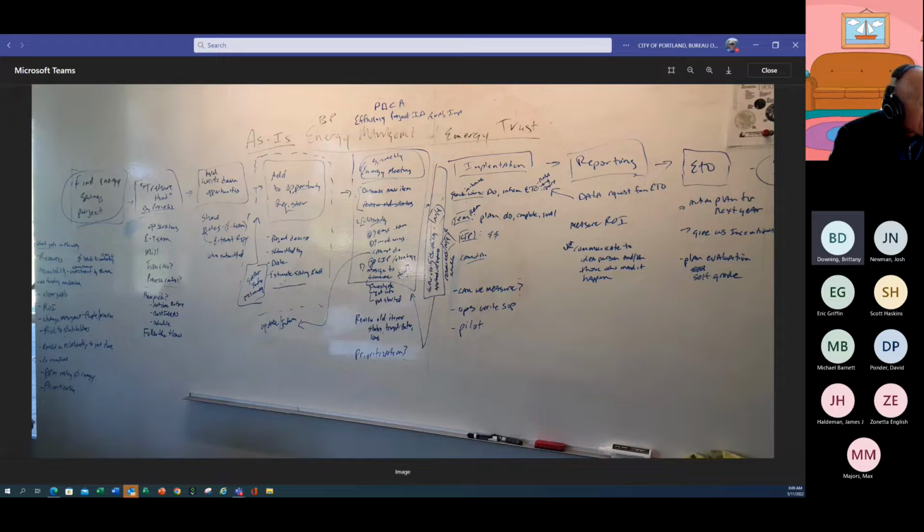The first one would be quick wins, basically something we can quickly do, wouldn't require a lot of money and wouldn't really require a lot of effort. Gems being, it might take a little bit more effort, but the savings would be great and it would be a huge win. And then going up is next our CIP strategy. So it costs a little bit more money and even a little bit more strategy. And then we would have to kick it over to our engineering team.